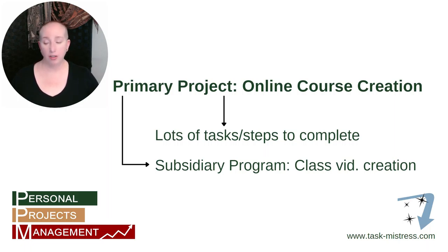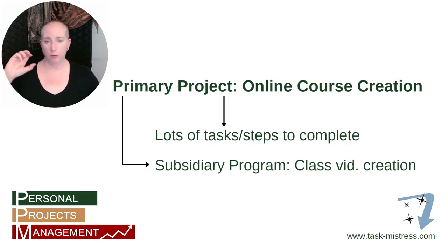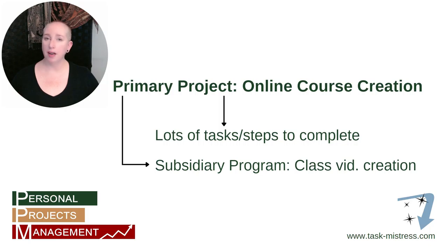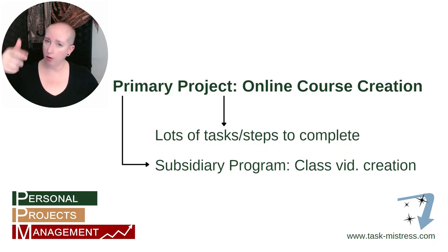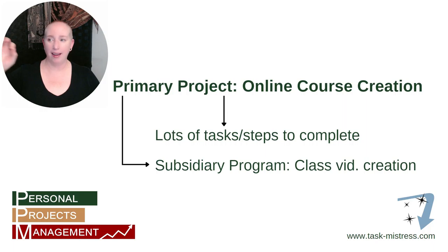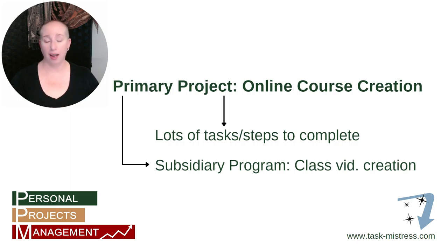There's a lot of steps, but you can batch things together — script 10 outlines in one day, then record four or five videos all at once another day. You're still not going to do it all in one day, so you need a way to track it — that's why you have a subsidiary program worksheet. On the primary project worksheet for online course creation, you'd have a step that says 'Create Class Video,' and that single line item represents everything on the subsidiary class video creation worksheet.